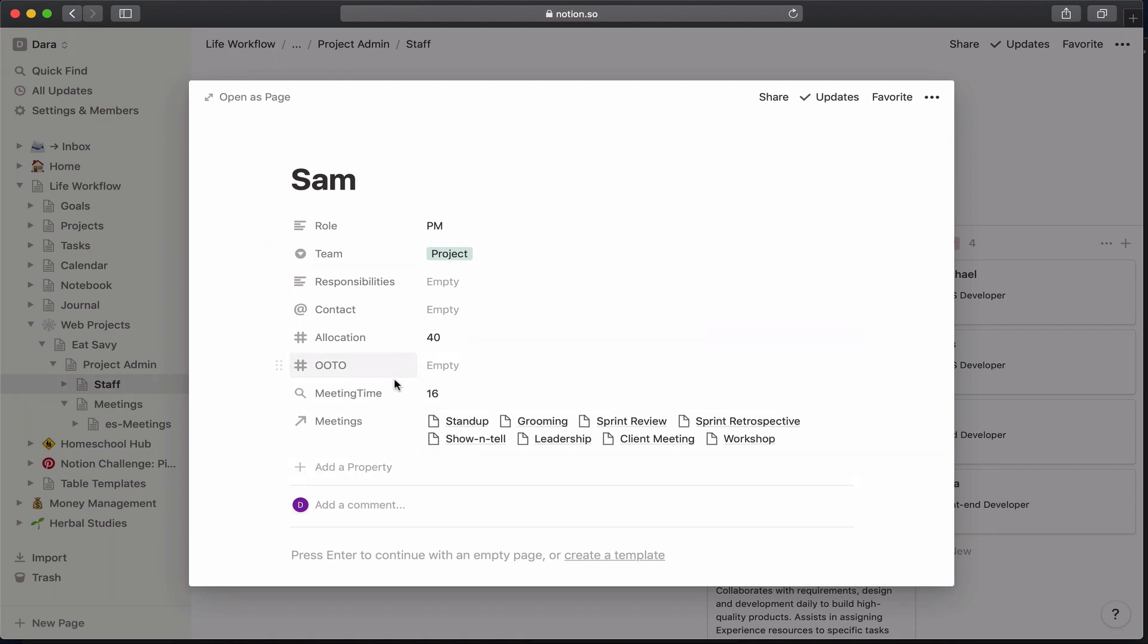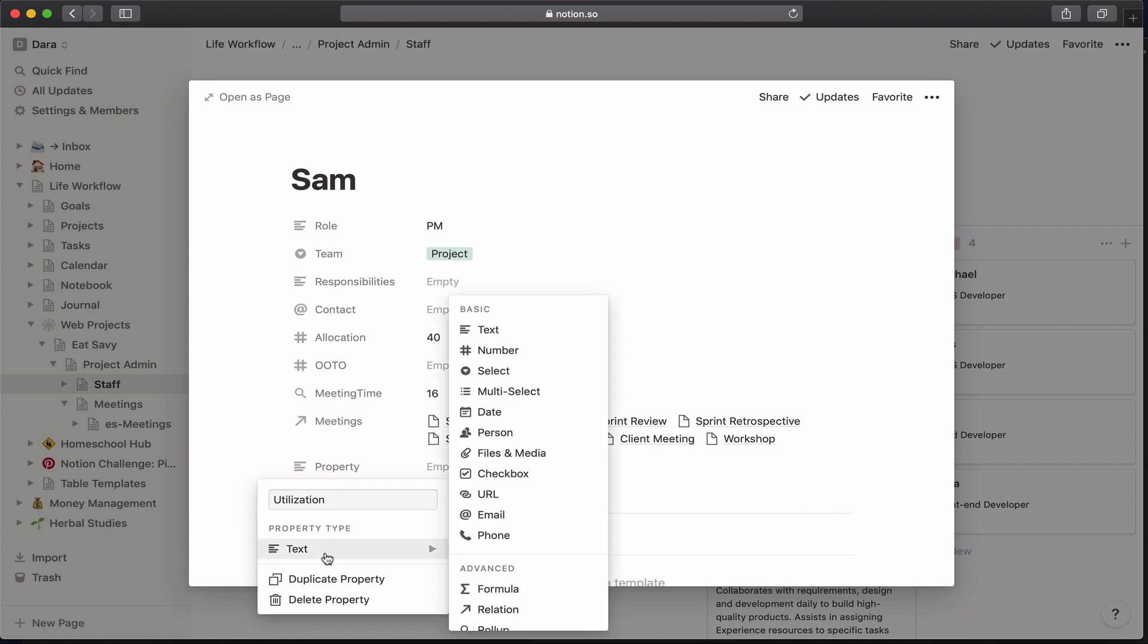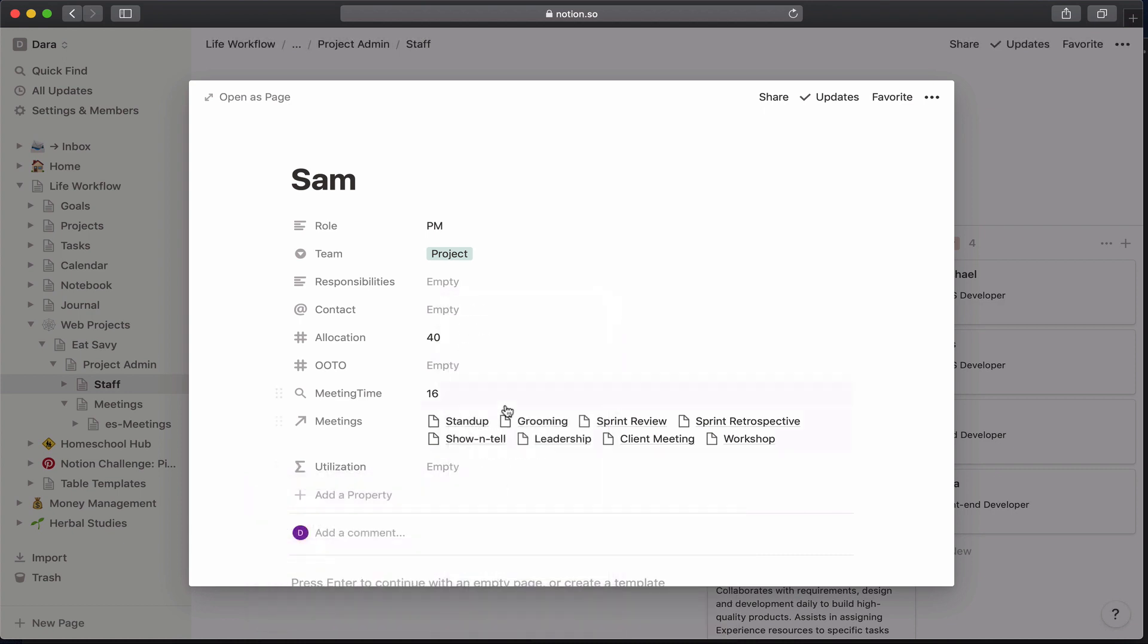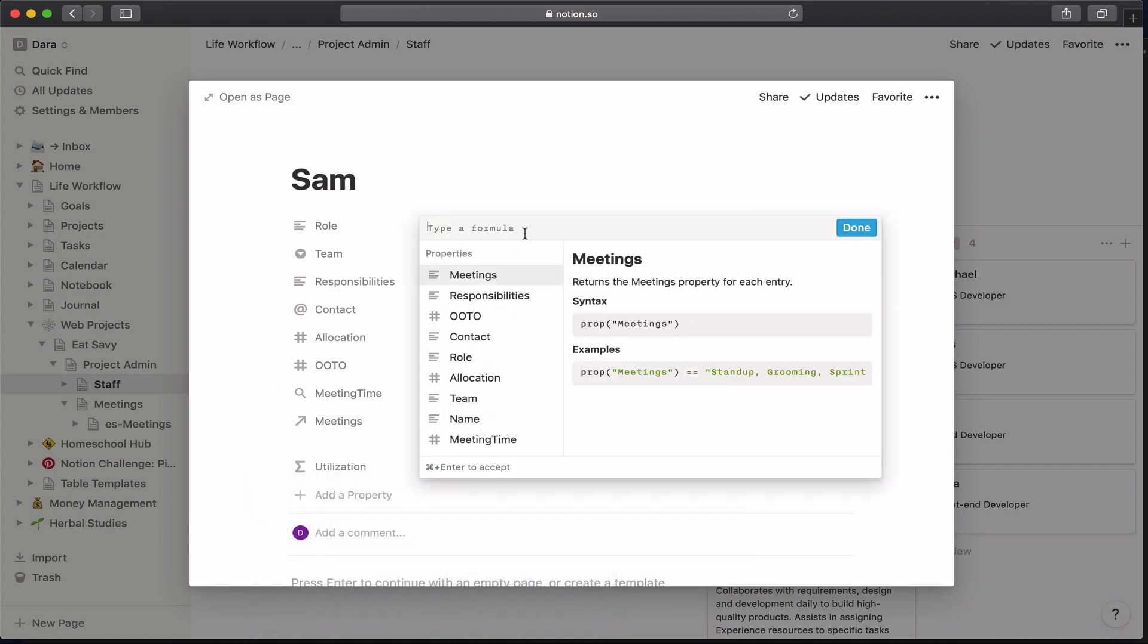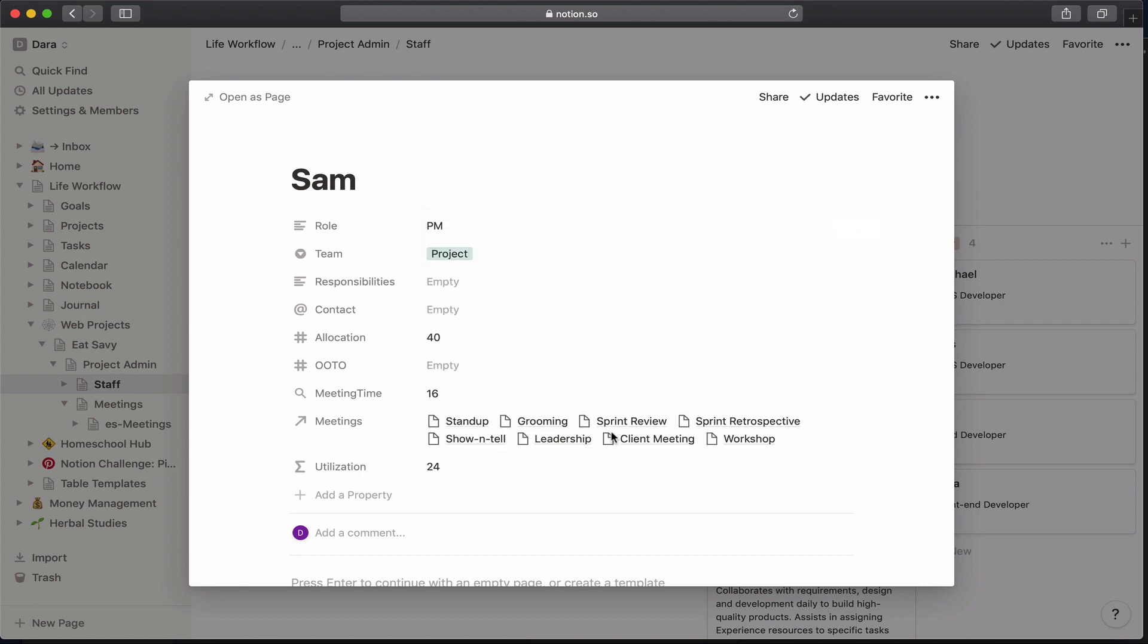This is where the fun part starts. I'm going to go ahead and calculate out how much time is left over. So I'm going to choose to do this as a formula. And I'm going to do the allocation time minus the out of office minus the meeting time.